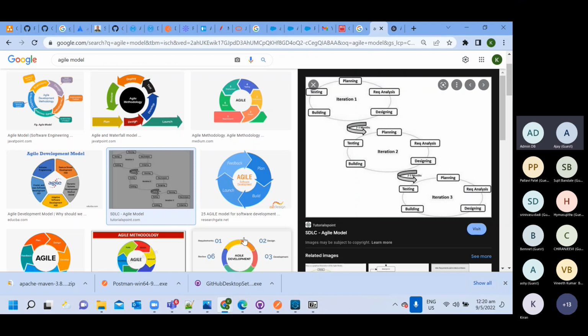And based on the developer capacity, you will assign, okay, this developer can deliver 10 story points in one sprint. So I will give him 2 tasks, one task having 7 story points, one task having 3 story points. One junior developer is there, he will be able to deliver only 5 story points. So I will give him not 5, it will always be odd. Let's say he will be able to deliver 4 story points. So I will give him 2 stories, one with 1 story point, another with 3 story points.